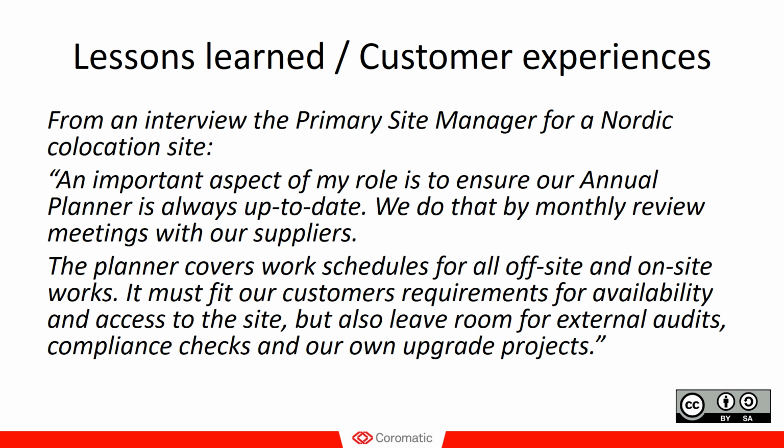And what the primary site manager sees as an important aspect of the role is to ensure that the annual planner is always up to date. It isn't just planned once a year and that's it. It's actually reviewed every month together with the suppliers. That is to make sure that the different planned works do not interfere with each other and they do not block the end customers from gaining access to the site.